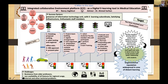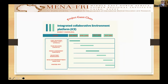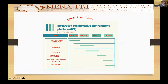This was the road map done by us. At the beginning of this year, we divided the project plan into four milestones. The first four months were for planning, taking the IRB approval, and visiting the regional center of Teams. We are currently in the second milestone: team building with technical support from the university IT, building logistics, and conducting a needs assessment via Microsoft Forms survey. At the end of this year, we have to present a poster. This was the Gantt chart.